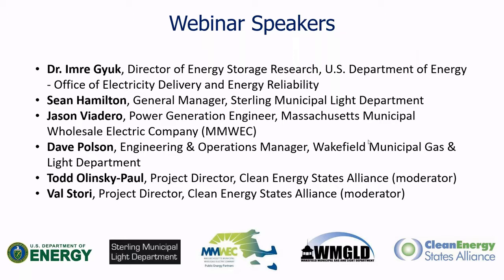Thank you, Sean — that was a great presentation. It seems like it takes a village to build a storage project. Before we let you go, I wanted to ask one clarifying question. Dr. Zhuk mentioned a six and a half year payback period — what are you seeing now for the Sterling batteries? It is projected to be a full payback within 6.2 years without any grants. We are fully paid back already with the grants we received from DOE and DOER. Without the grants, it'd be about 5.2 years. We originally projected seven years, but the grants expedited the payback.